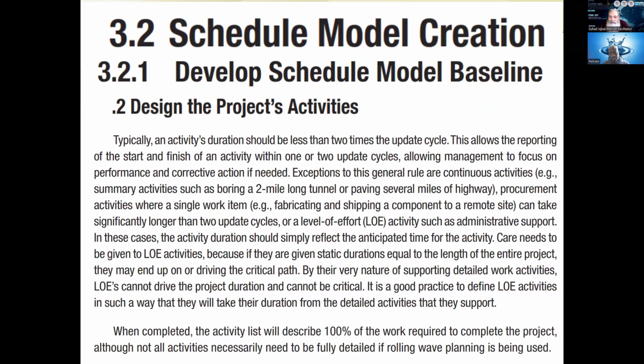So they will equal the critical path, right? So care needs to be given. Don't be confused that the LOE activity is also critical, because if they are given static duration equal to the entire project, they become critical.